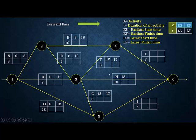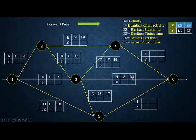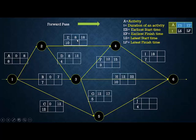Activity H also has B and D as preceding activities, so ES of H = max(7, 12) = 12, and EF = 12 + 10 = 22. Activity I has two preceding activities: F and E, with EF values of 15 and 18. Taking the maximum, ES of I = 18, and EF = 18 + 7 = 25.